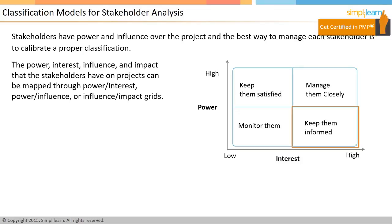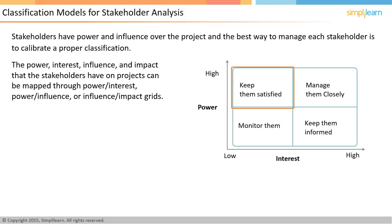The stakeholders in the bottom-right quadrant, with high interest but low power, need to be kept in the loop — share information with them and keep them regularly informed. The stakeholders in the top-left quadrant, with high power but low interest, can be managed by keeping them happy, for example by making sure their interests and opinions are taken into consideration. The stakeholders in the bottom-left quadrant, with low power and low interest, may be managed less actively by simply monitoring how things are going with them.